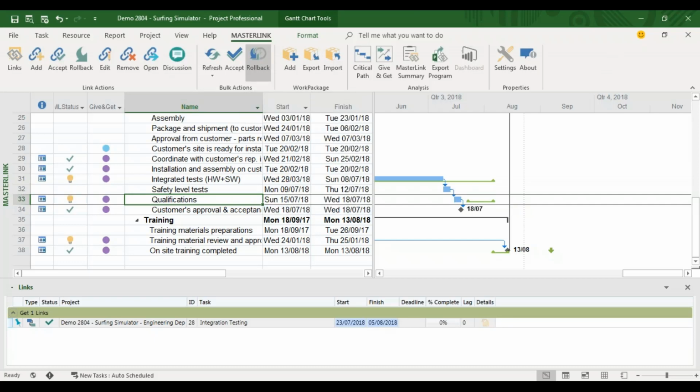we have a gap. So I know there's a change, I know what the change is, but the impact of implementing that change is something that right now I wouldn't want to go ahead and do, and I decide to just leave it as a gap. And this is what the MasterLink gives us. It gives us strong visibility of where my gaps are.